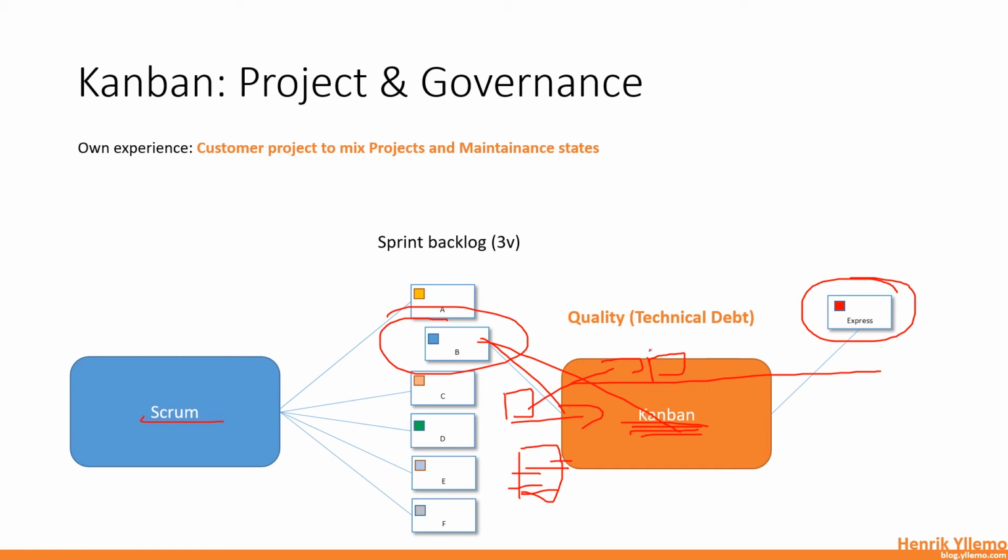So it means that we had to focus everyone that can bring value to this ticket and make it move faster, and really prioritize that on top of everything else. That means that we couldn't have too many of those, of course, because it puts a huge stress on the team if we have too many of them. But it's a nice thing to have some kind of expedite express type of thing.